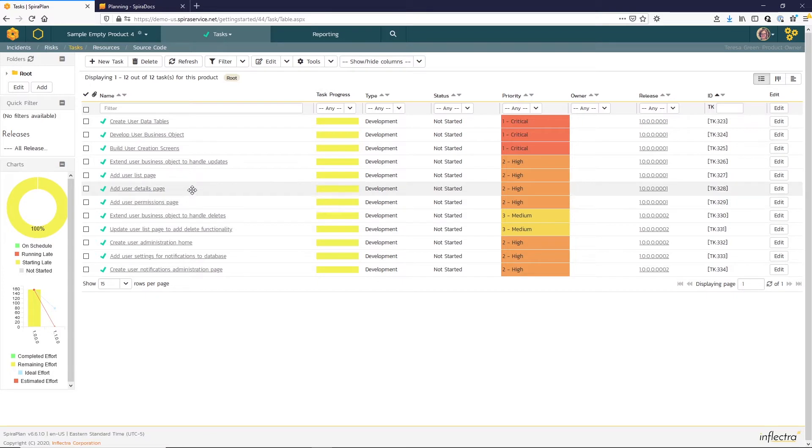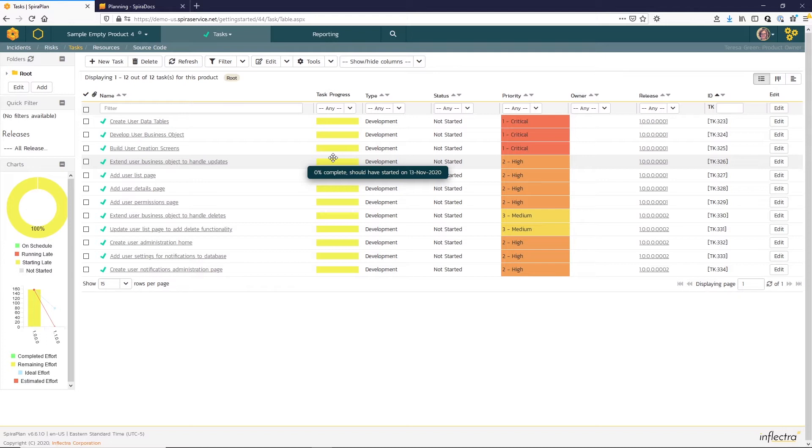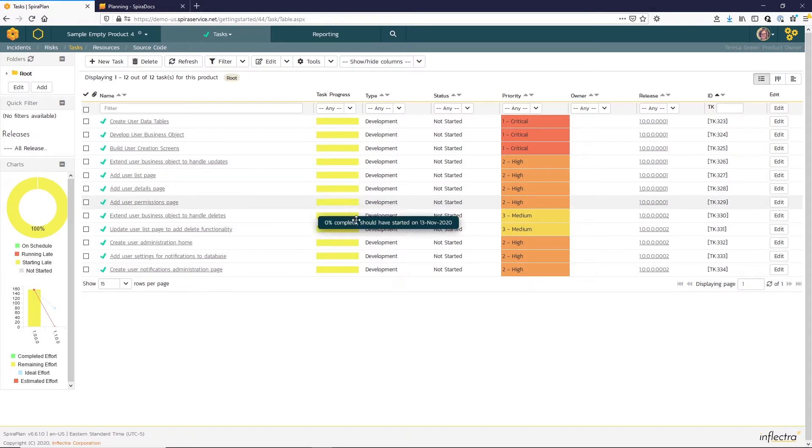In the task list view, you can see the task progress. All the tasks have not yet started, and the highlighted yellow bar indicates late starting tasks. You can also look at other key fields like priority and scheduled release.